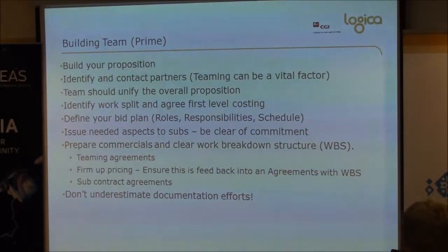When you're looking at your finances, don't underestimate documentation for ESA. They have a lot of standards in place. This does require an effort to put documentation together. So don't underestimate it. Be clear of what standards are applicable and what documents are applicable. It's like the ECSS 40, for example, yeah, which is their methodology. It describes all the documents a particular type of program will require.